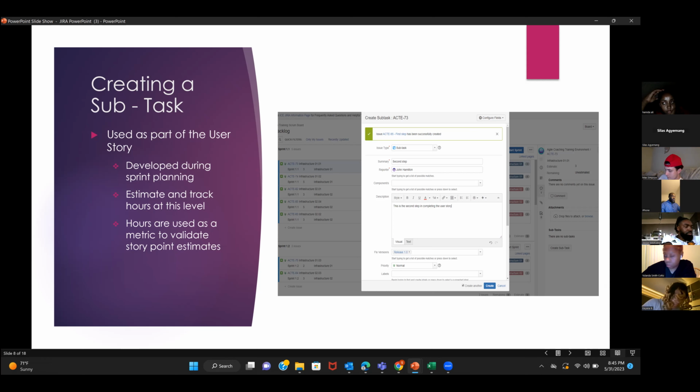And with story points, based on whatever the team does, right? A team could say, okay, our story point is on a scale of 1 to 5, or it's on a scale of 1 to 10. I'll use a simple example so we are all on the same page. From 1 to 10, 1 being maybe it's going to take a day, 2 being maybe it's going to take 2 business days, or 10 being it's going to take 10 business days for me to complete this work, right?